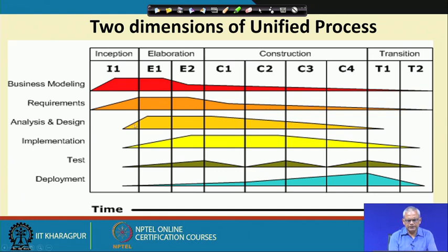The analysis and design peak during the elaboration and construction and slowly taper off. Implementation peaks during the construction phase and tapers off, but there is some construction during the elaboration phase also. Test is present throughout and deployment peaks towards the transition.